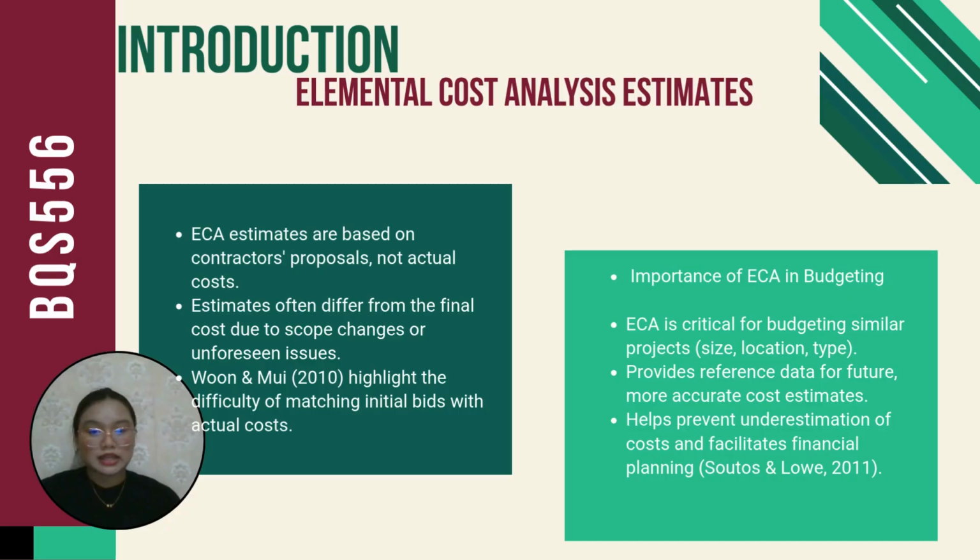ECA estimates are also based on the contractor's proposal and not actual costs. Estimates often differ from the final cost due to scope change or unforeseen issues. Woon and Moy 2010 highlight the difficulty of matching the initial bid with the actual cost.